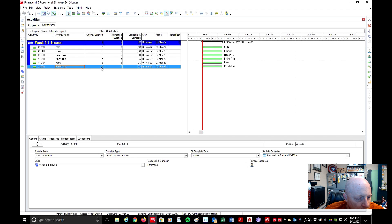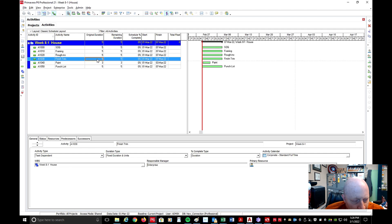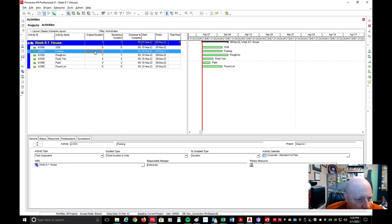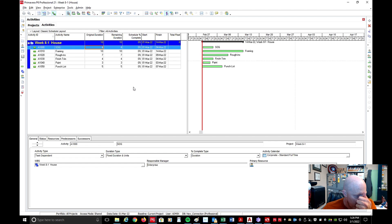Now I want to change the duration on these. Paint is going to be three days. Finish Trim, we'll do four. Rough-Ins, maybe seven. Framing, I'll put at ten. And Slab on Grade — which will include grading, prepping for the slab, and then the actual pouring of the slab — I'll just do four days there. So now I have these activities.